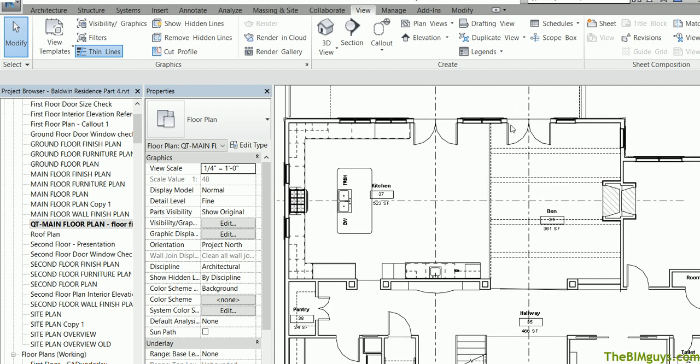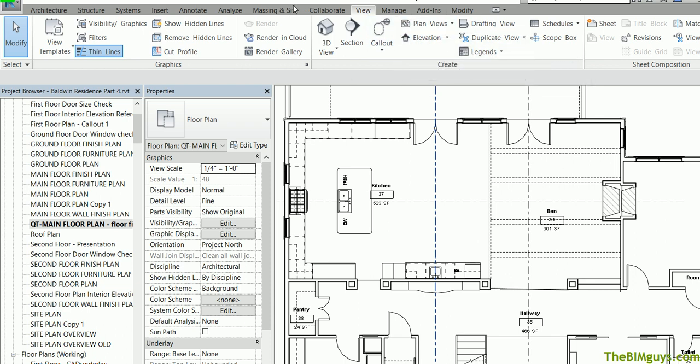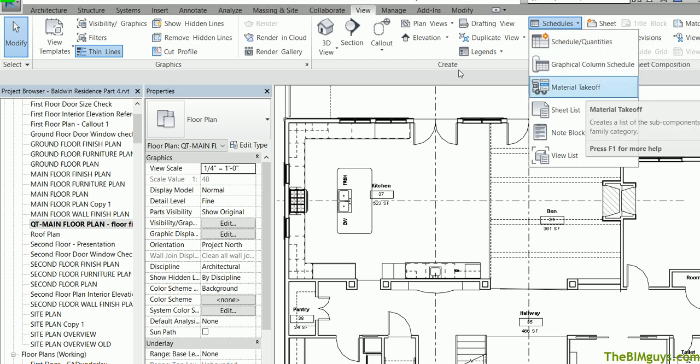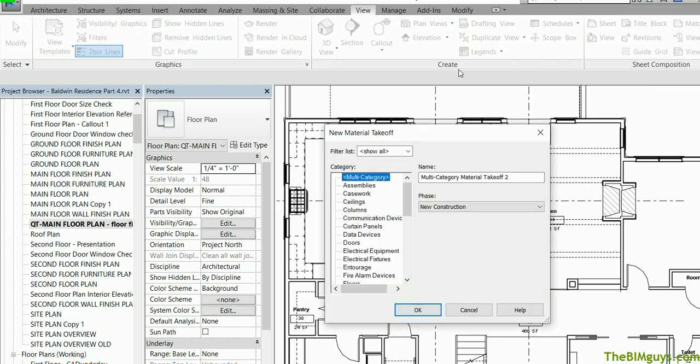We're going to go up top to our view tab. We're going to fire up schedules. Now instead of using the regular schedules we're going to go material takeoff. When we fire up material takeoff it's going to say what do you want to pull materials from. And what this does it peels the wall apart and peels the ceilings apart and floors apart and it separates the materials out and will give you the square footage of those elements.